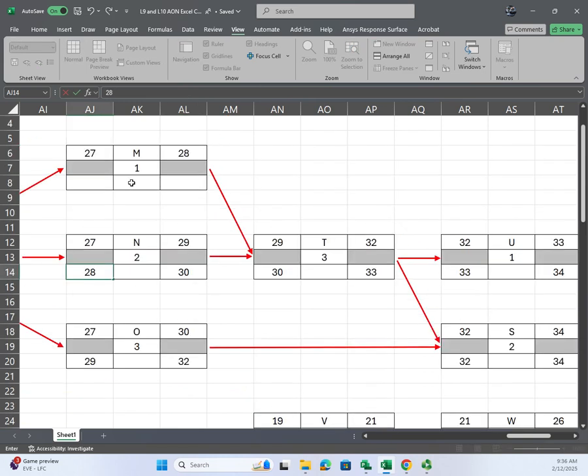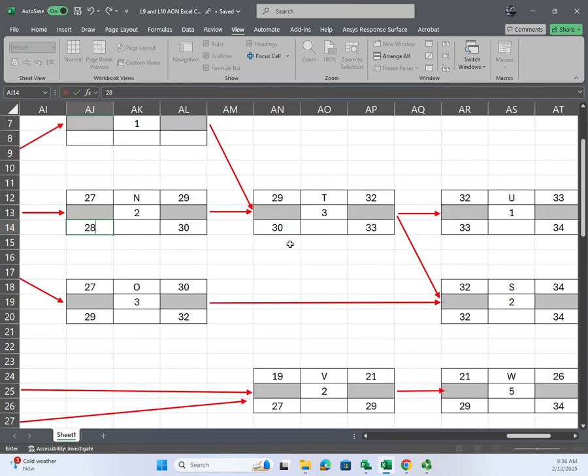Hold up. What is W? The interstate for? 34, 29. 29 passes back. So use the biggest number. Biggest number. There's two. Right, so that's why U was 33, that went to T, even though T went down and shared with S.